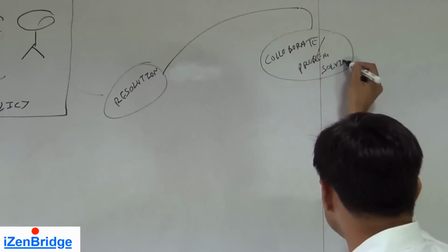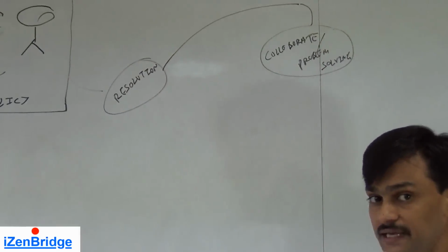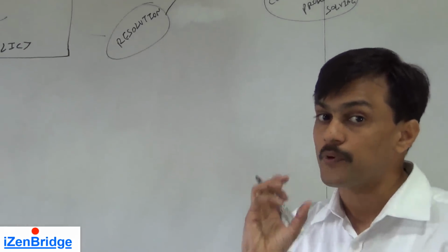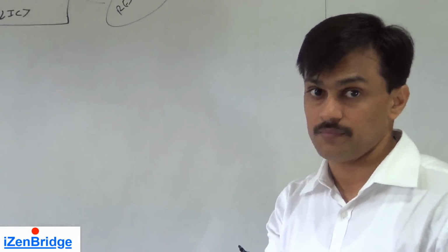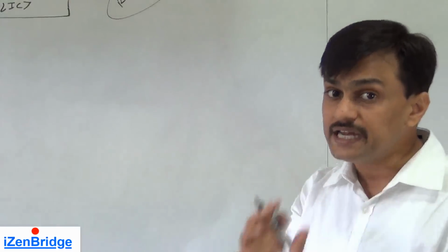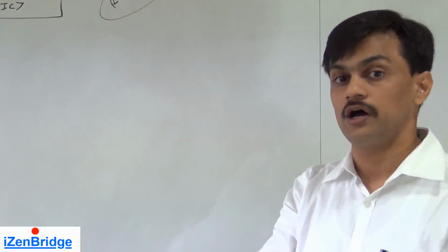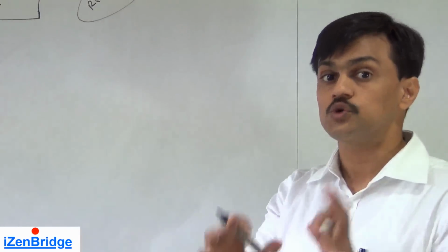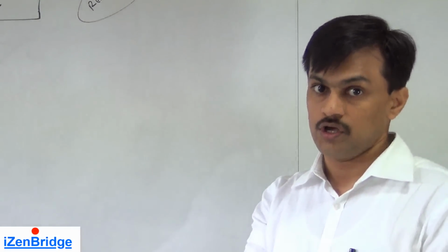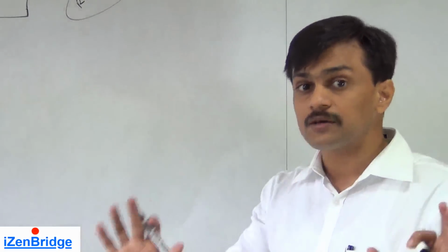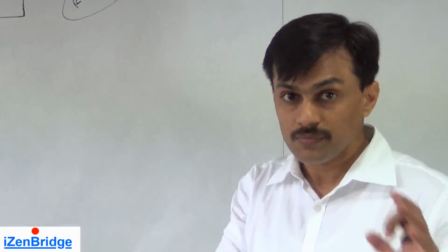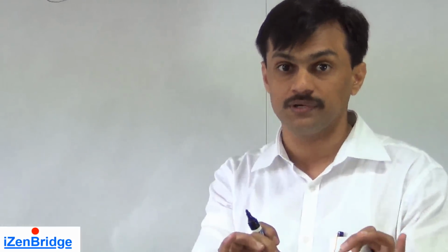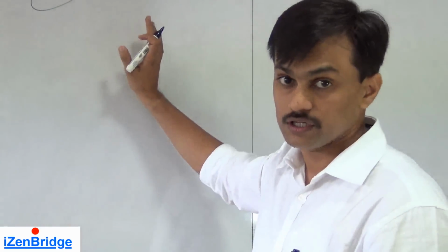In this conflict management technique, we try to get deep into the problem or the reason of the problem, and we find the right option based on clearly defined criteria which helps to achieve project goals. So both the parties look at the problem just as a problem, keep their emotions away and find the best possible solution for the given conflict situation.